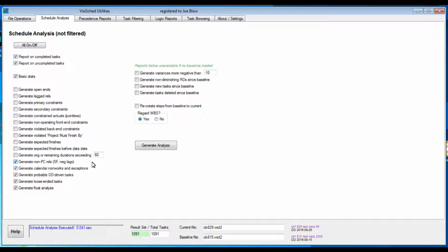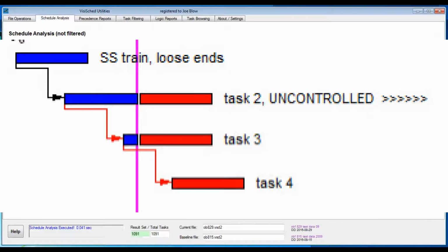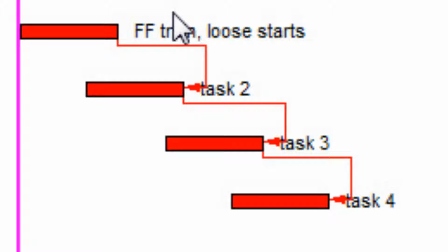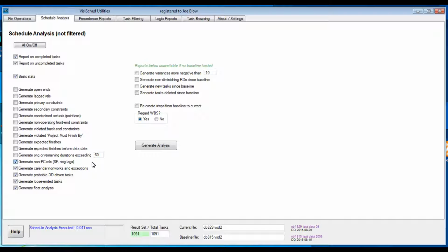These are okay if they're comfortably out in the future, but a subsequent lengthening of a task duration will likely have effects not modeled by the CPM. When a loose-ended task has started, its remaining duration is now uncontrolled. You could extend the task out for years with no apparent impact to the project. This is unlikely. Similarly, a loose-started task could be forecast with a longer duration. The CPM solution is just to start it earlier. Realistically, additional logic or ties should be made. In any case, VU can identify these for you.